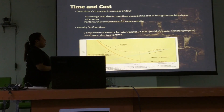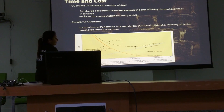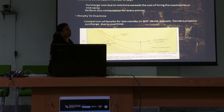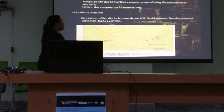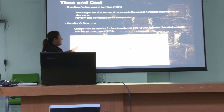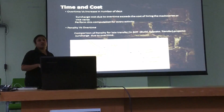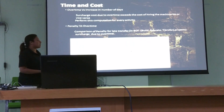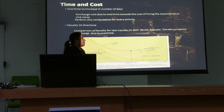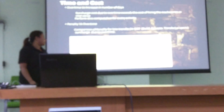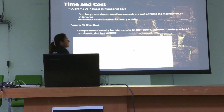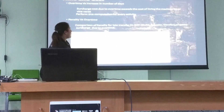This graph roughly shows how time and cost are related. The blue line is the cumulative direct cost — if a machine costs 50 dollars per hour and I hire it for 100 days, its cost will surely be less than hiring it for 50 days, which is why it is a split line. The direct cost covers materials and labour: at the start of a project we need a lot of materials which are the major cost, and as we go on the materials required decrease, and at the end only the labour cost remains. If we sum both costs we get a total cost, and we can see there is an optimal point representing a critical time and critical cost. We have to find this optimum point.